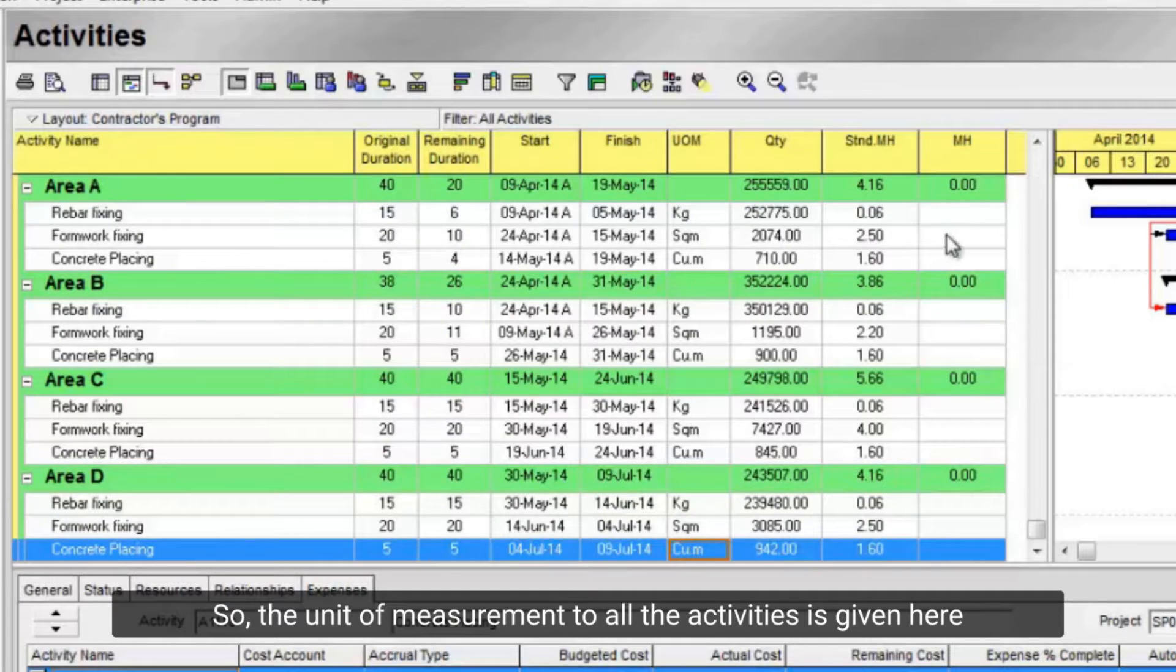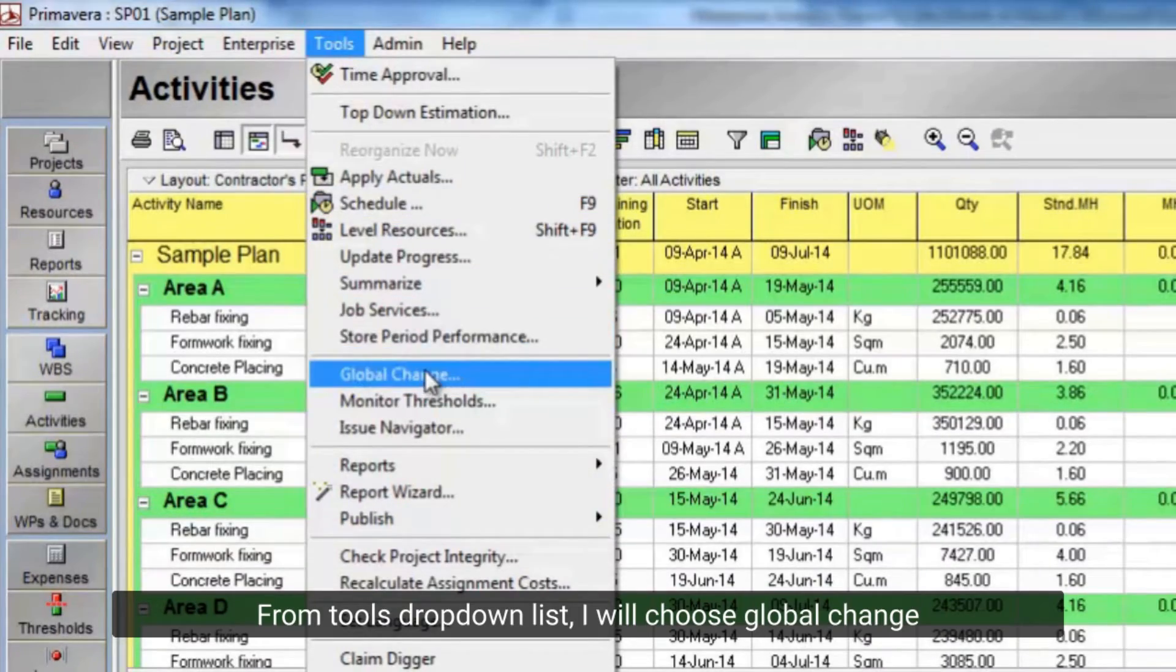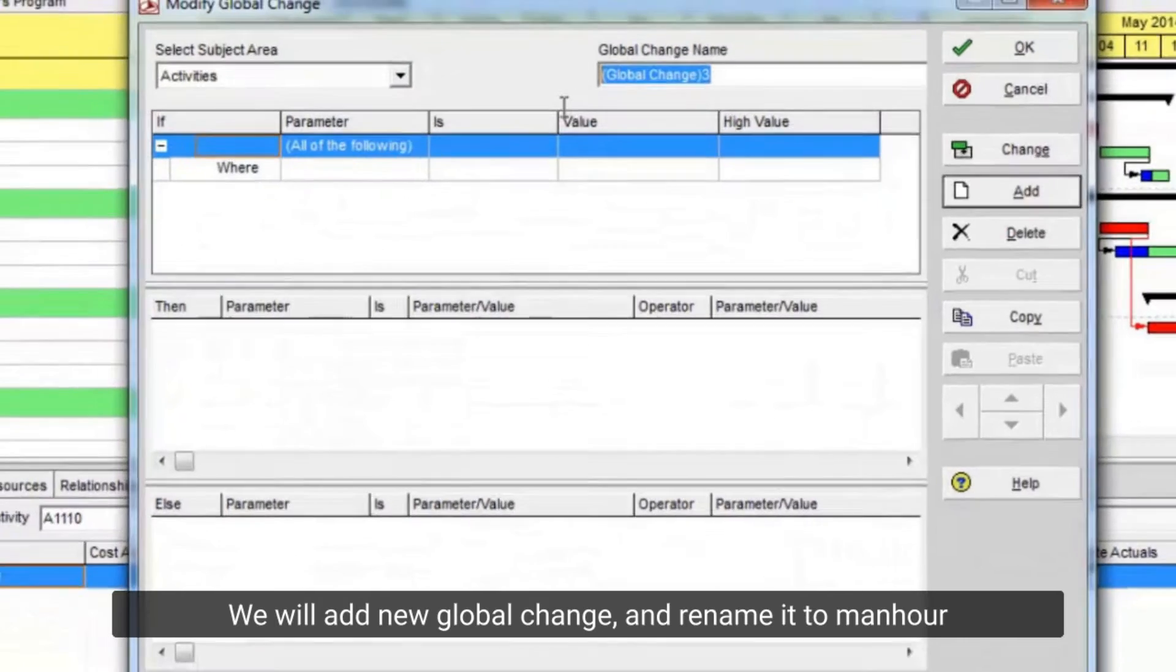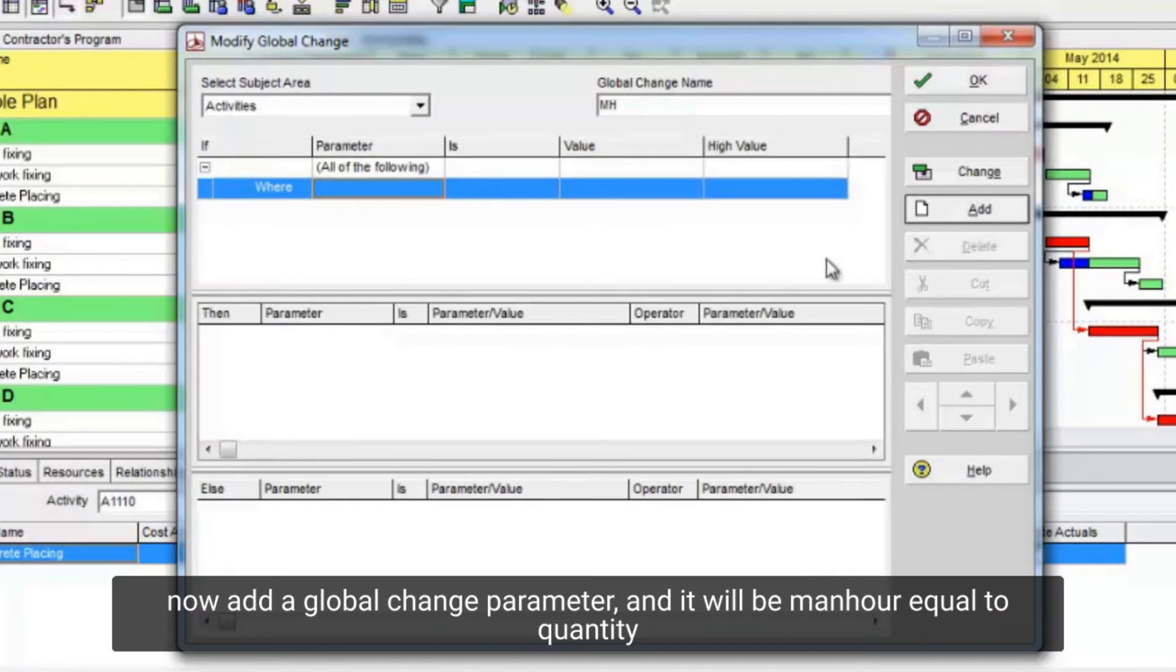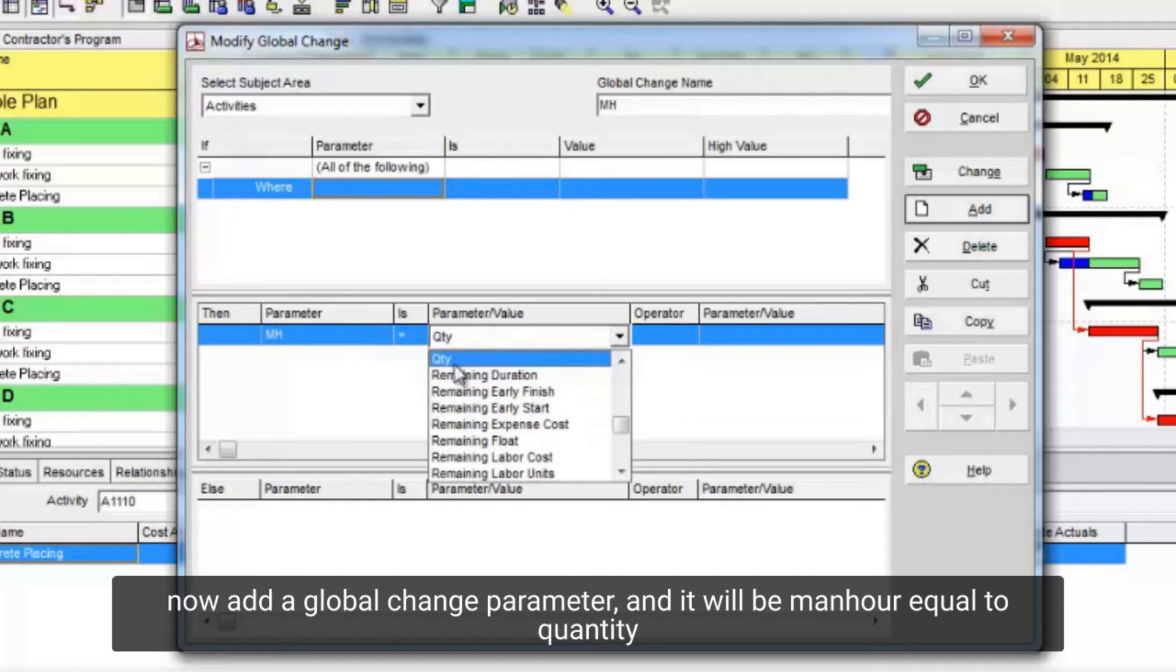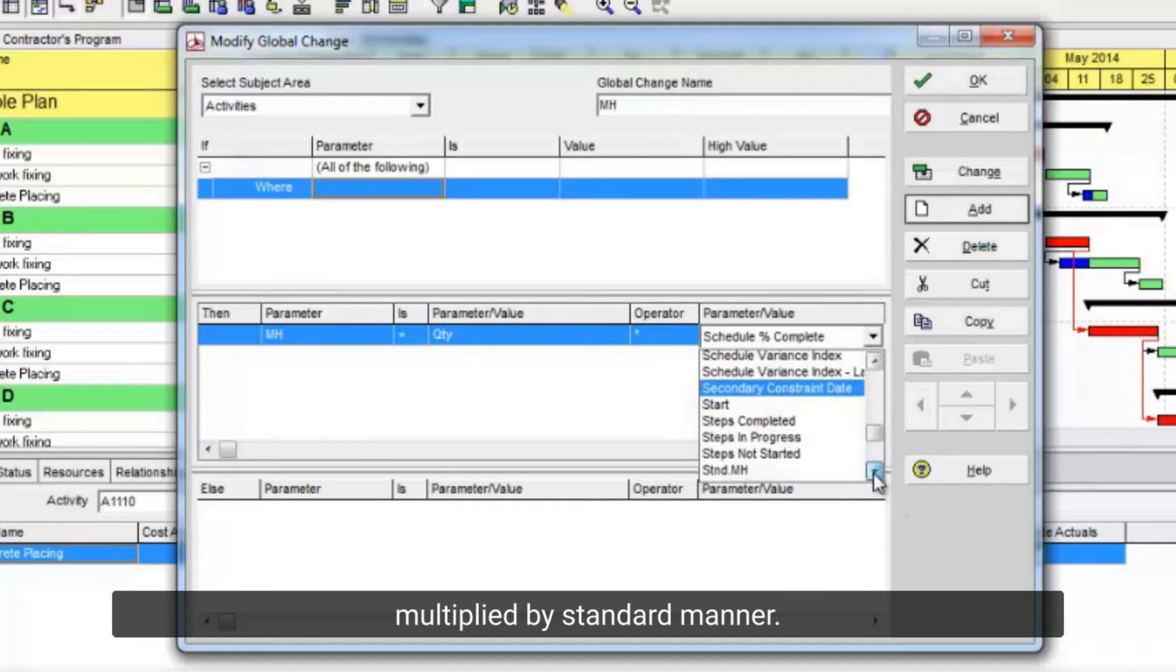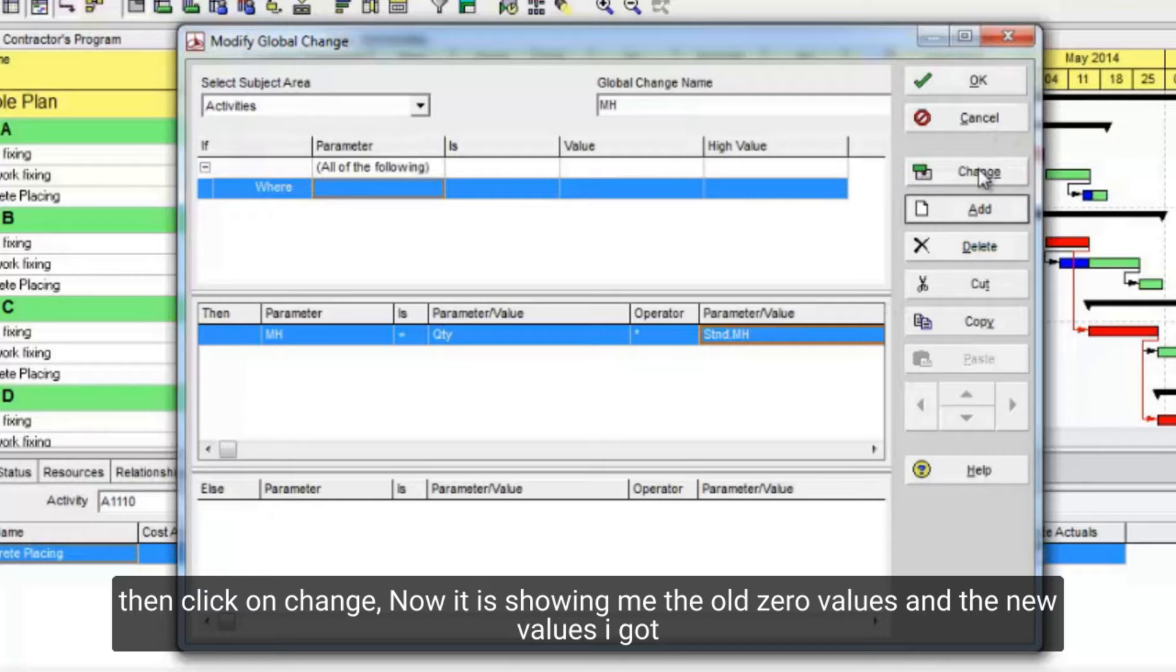Now I will apply a global change to find activities man hours requirements. From tools drop down list, I will choose global change. We will add new global change, and rename it to man hour. Now add a global change parameter, and it will be man hour equal to quantity multiplied by standard man hours.